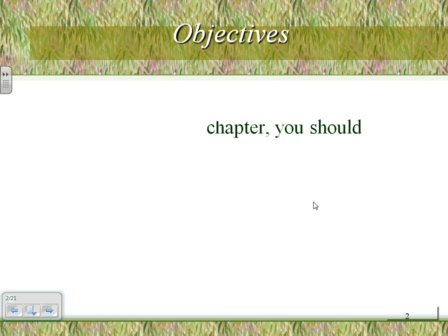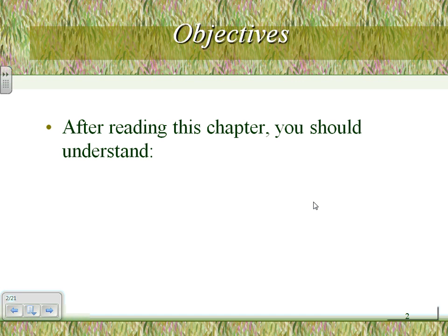Estimating process. If you remember the estimating process, we said there's estimating and bidding. Does anybody remember the difference between estimating and bidding? Bidding is price. Estimating is how much it's going to cost you. Bidding is how much you're willing to sell it for, and the difference is the profit. It's going to cost me $100 to build this system, and because you're my friend, I'm going to sell it to you for $100. I'm making no profit, but I keep my electricians working. Or I want to add 10% profit so I can go to Hawaii with my wife and my children, right?